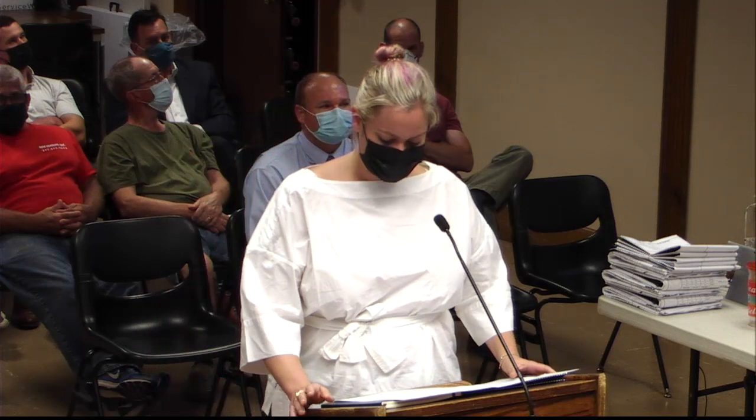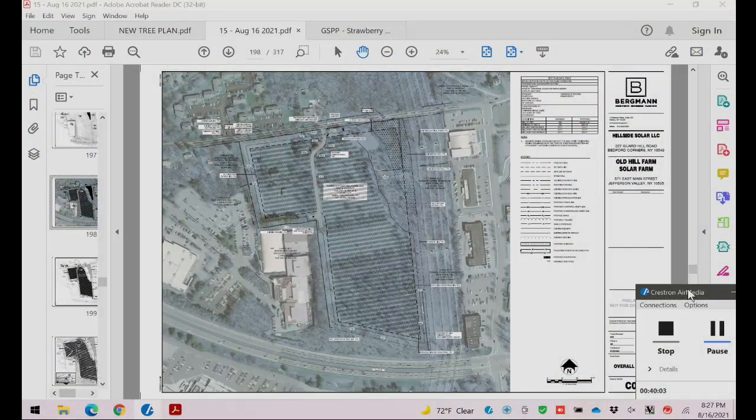Part of these incentives for solar in New York are rebates provided by NYSERDA. And the project can receive allocation when it receives interconnection approval, which we already have from Con Edison, and, in the instance of ground or canopy projects, the negative SEQRA declaration with the Department of Environmental Conservation.